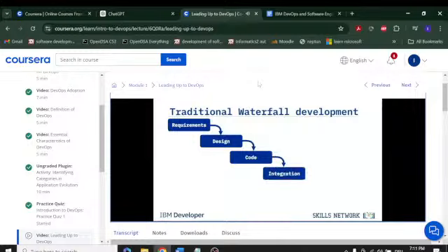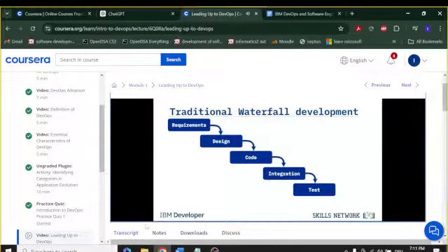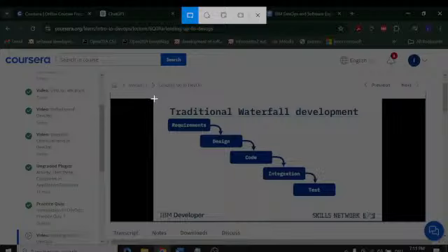Finally, you get to the integration phase when all those modules come together. This is the first time we realize we don't know whether all these pieces even work together. And then we move on to the testing phase, because now we've got a system that people can test. And as they find bugs, they must go swim back up the waterfall and open some bugs in the coding phase and do some recoding. Finally, after all that testing, we deploy the software.